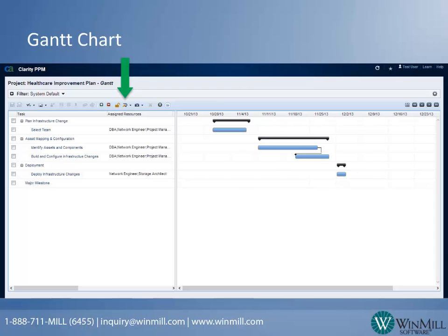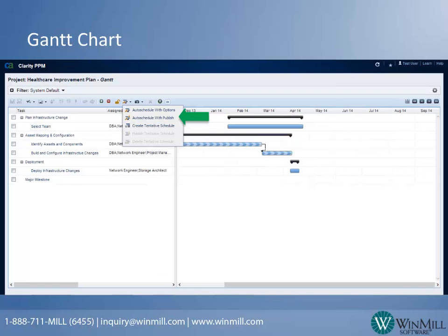Let's click on Auto Schedule to modify the dates per the new task dependency. After clicking Auto Schedule and Publish, we now see the task timelines have been properly updated. Another note, the Workbench scheduling tool has been enhanced as well to make complicated task lists easier to manage.